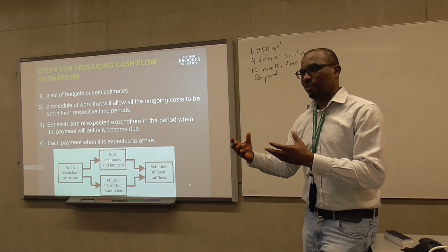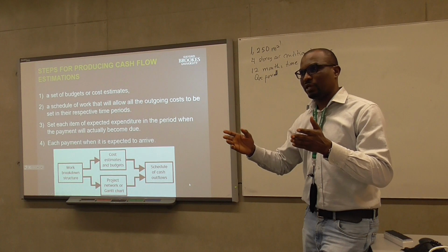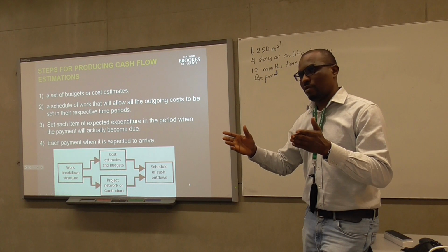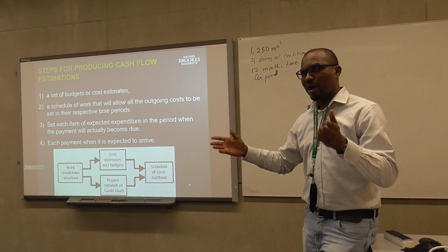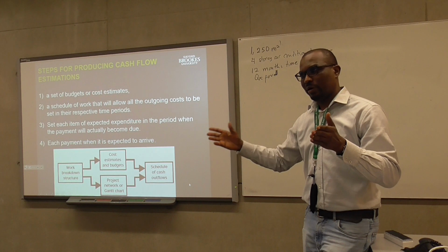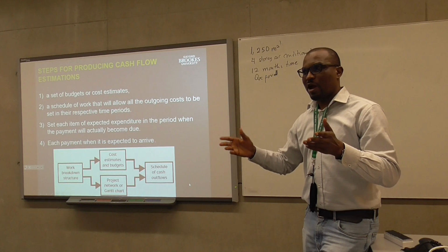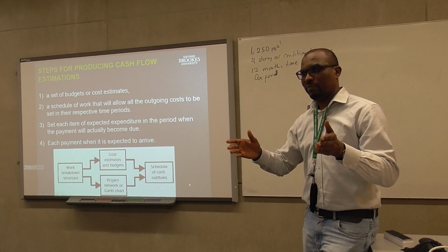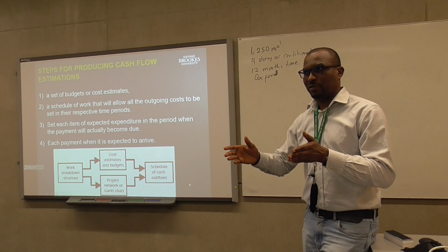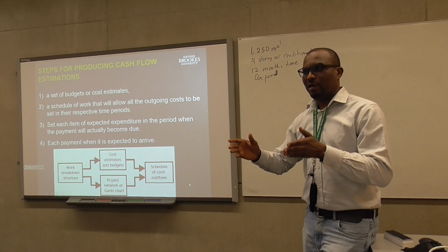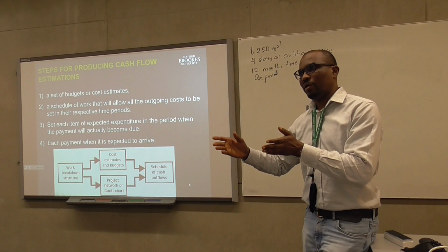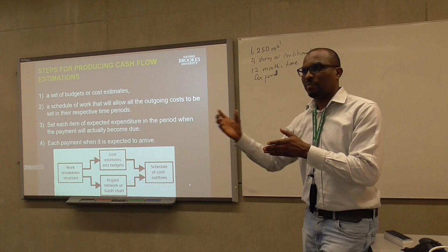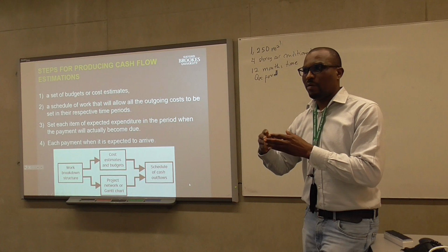If I get onto a project, let's say the project is maybe 100 million running over 12 months, or maybe 120 million running over 12 months. On the average, I'm probably spending about 12 million a month over these 12 months, right? Why would I want to spend maybe 60 million up to month 6 before I get payment from the client?